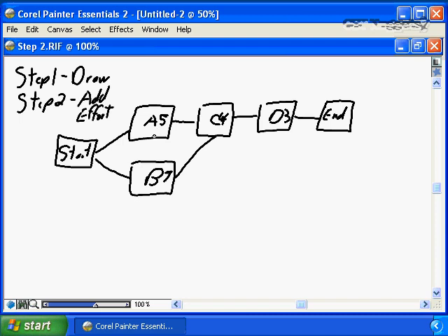That is true. That again is why we will use a piece of software, such as Microsoft Project, to draw our network diagrams for us, because it will address the issues, the limitations, the impact of having resource number 1 required to put 5 days worth of effort in, but they're only available 80% of the time to make allowances for sick, vacation, and other unavailability.